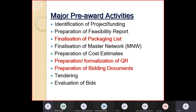There are some qualification requirements - technical and financial. When we are selecting a party or agency, we have to see the technical and financial profitability. To know the financial profitability, there should be some indicator that the company has that financial capability, and to find that out we should have a cost estimate for the particular package. Based on the package, there is some formula, and based on that formula we will keep some configuration for turnover.